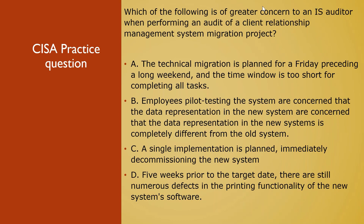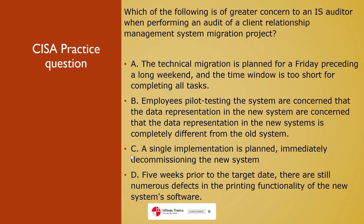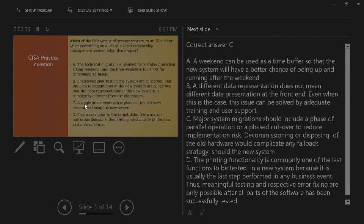The concept behind this question is system changeover technique. There are various types: parallel changeover, direct cutover, or a phased manner. The riskiest approach is moving from an old system to the new system immediately — called a direct cutover or immediate changeover. In that case the risk is much greater for the organization, and that is where the auditor should have the most concern. Option C is the right answer — a single implementation planned with immediate decommissioning of the old system.